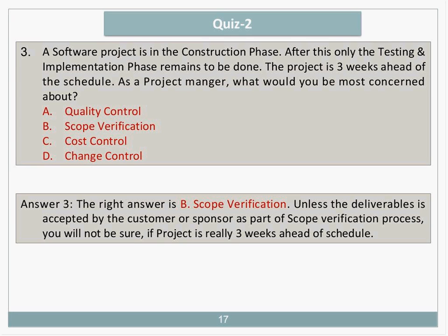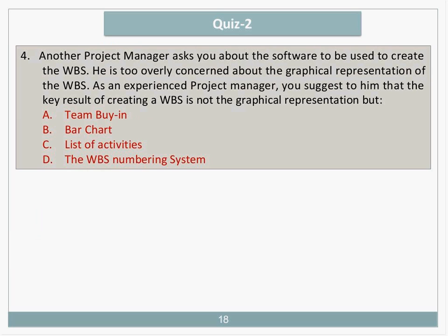In question 4, another manager asked about the software to be used to create the WBS. He is overly concerned about the graphical representation of the WBS. As you remember, there are a graphical representation or outline representation that we can use. An experienced project manager told him that the result of create WBS is not a graphical representation, but our list of activities or the WBS number system.